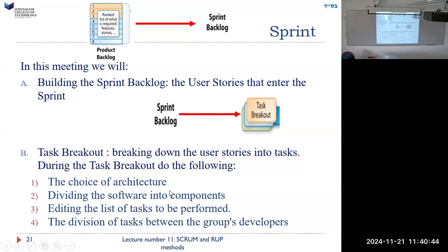In other words, we get one guy who does all the database work. So we'll tell him what fields to add to the database. And the programmer will program as though those fields exist, and by the time he finishes the program, they will exist. But we don't necessarily ask the programmer to change the database. Maybe we'll give the database guy 16 tasks for different stories that are all related to the database. And it'll be more efficient that way.